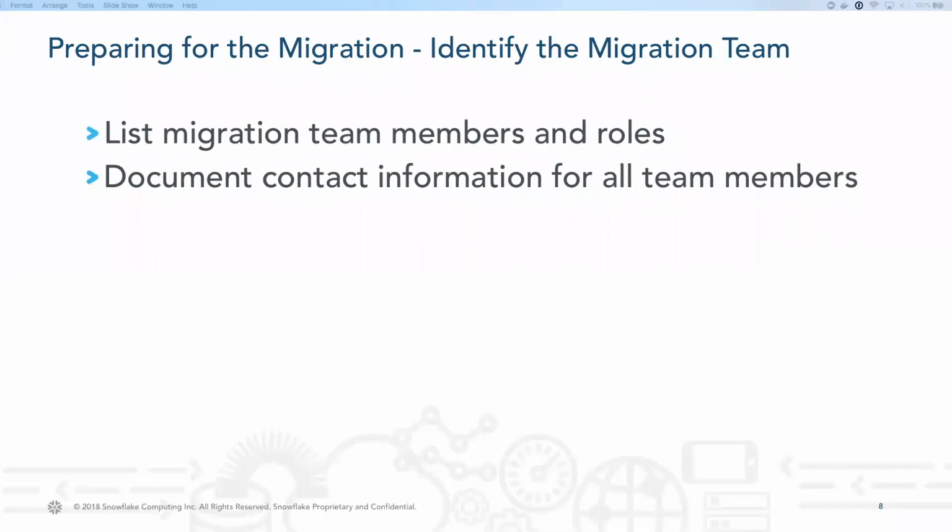As part of the preparation phase of a migration, resources need to be identified. Some common roles needed for the migration are developer, quality assurance, business owner, project manager, program manager, scrum master, and communication. When a Snowflake solution partner is engaged for a migration, they may fulfill multiple needs, including solution design, requirements gathering, documentation, development, testing, delivery, and training.